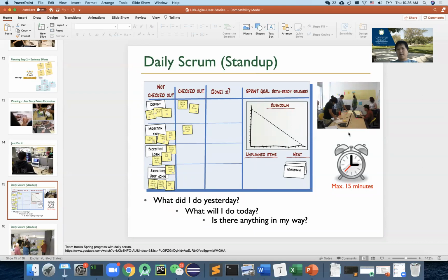Every team picks one member to update these questions: what their team did in the past week, what their team is going to do this week, and is there anything your team is facing that blocks your progress? So every team can pick one member to do a quick update, to simulate how the Scrum meeting goes.